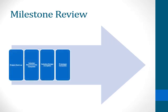Approaching the 4th milestone, we recap on the successful completion of the first 3 milestones, relating to the planning, initialization, requirements and design phases of the standard project management lifecycle. The initial milestone was the creation and acceptance of the project charter, which was the initial document that authorised continued work on the project. This document listed the general scope, deliverables and parties involved in the project.